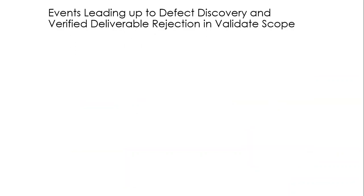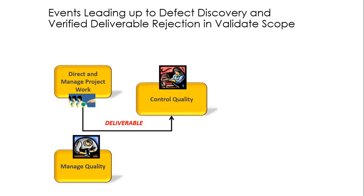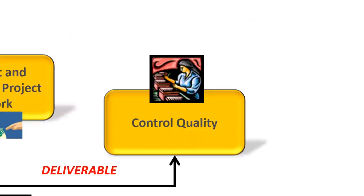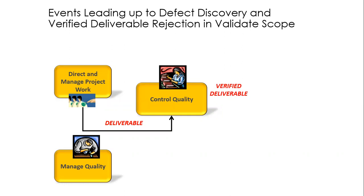The second scenario is very similar — it's events leading up to defect discovery and verified deliverable rejection in validate scope. Direct and manage project work, as usual, creates the deliverables. Manage quality checks the process before the deliverable is produced. The deliverable is produced and goes to control quality again. Inspection is front and center in this process — this is where we inspect the deliverable internally before it goes to the customer. If we find the deliverable is fit to go to the customer, then we label it as a verified deliverable.